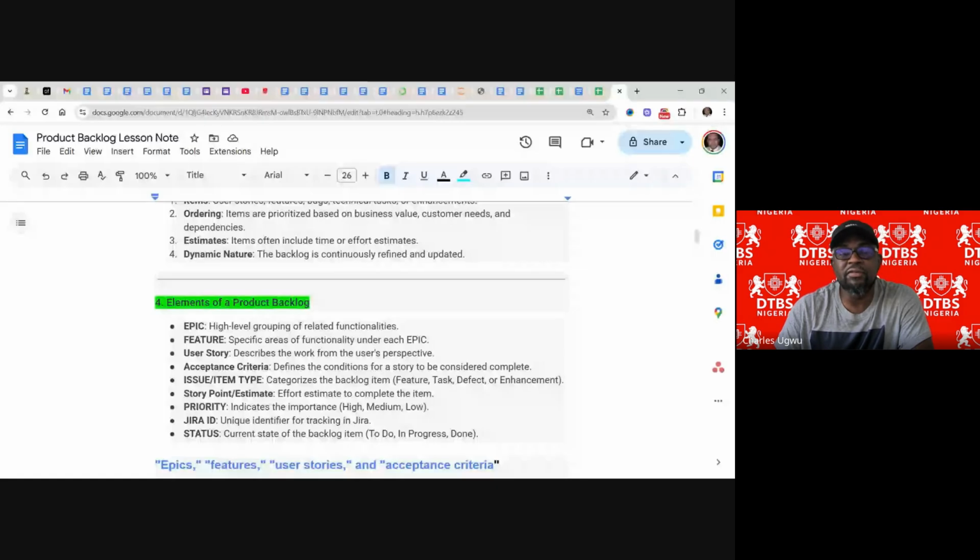For instance, if the total story point is 70 over 3 sprints, and every sprint we manage to finish 70 story points, then that 70 should be our standard.